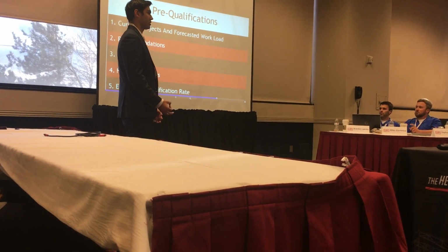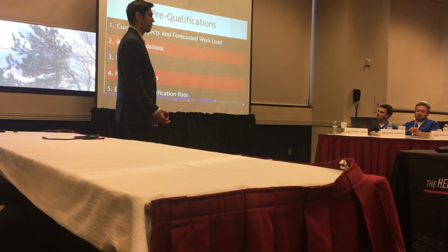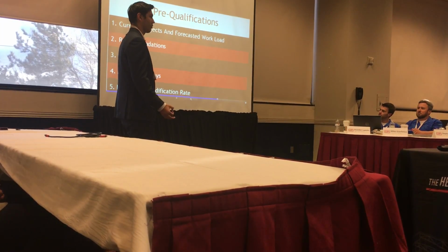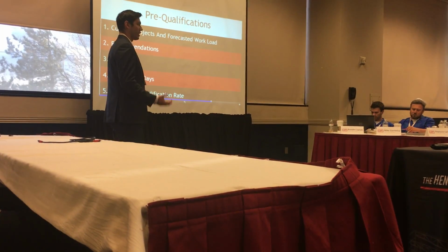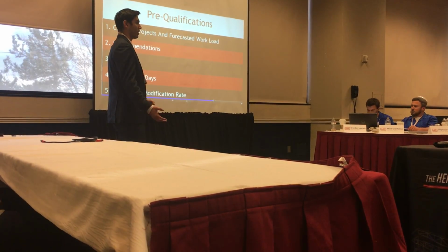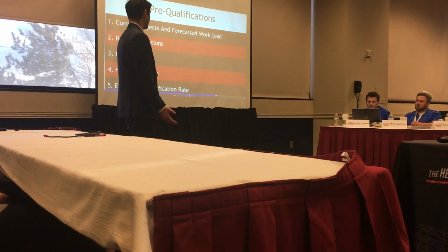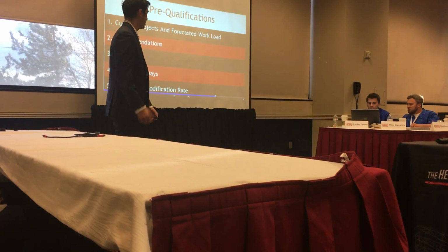Next, for this project, we require a $50,000 minimum bond rate at a $50,000 price, that's the price of their bid. So we took that into consideration. Also, we want them to have a 90-day hold on their proposals. And like Vache said, safety is important to us, so we want to make sure they have a good EMR rating.